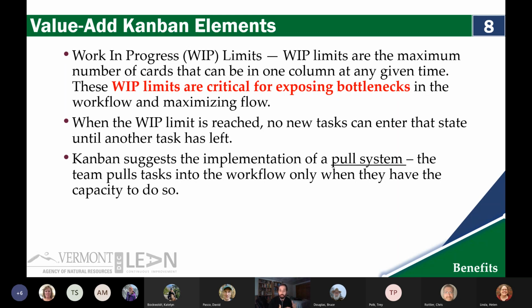So if we've got the buckets set up as individual categories of workflow and things stack up on a particular task, for example, one of the areas that I'm using a Kanban board for is tracking A&R online projects. And it's really easy to look at that and go, we are having a lot of projects stack up on one particular phase.